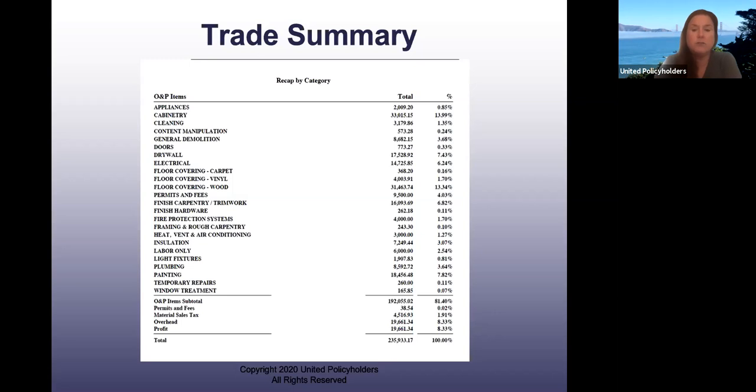Like if you've got a contractor going to rebuild your house, he's going to get an electrician to give him a sub bid. He's going to get bids from these subcontractors. So certain things they subcontract out, like electrical. A lot of them subcontract out drywall, HVAC. Some contract out framing. It's just different.